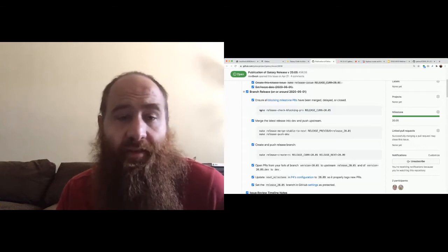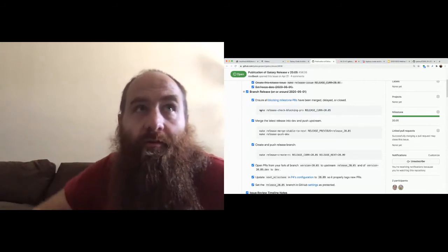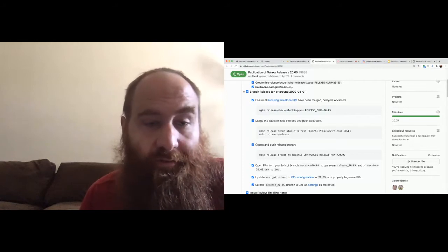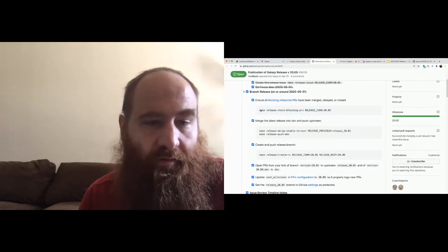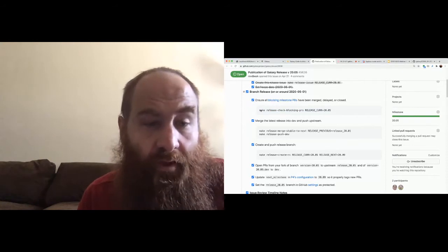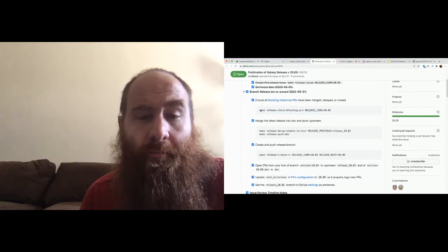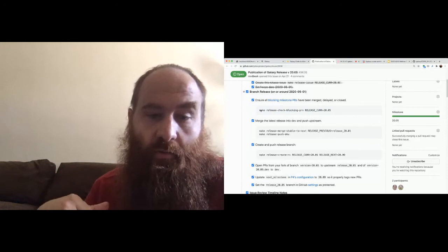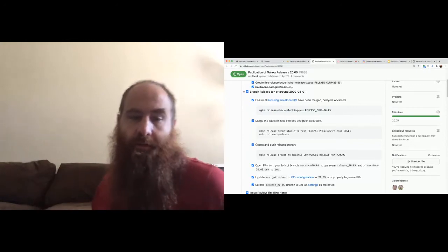We make sure that everything is merged up, so that the release freeze of 2005 has all of the fixes that were in 2001, for instance. And then we actually do the freeze, and so it creates a branch, it modifies Galaxy's version, etc. And then we update the milestone of all PRs. So all new PRs will be milestoned with the next release. So when we froze 2005, all new PRs had a 2009 target date.